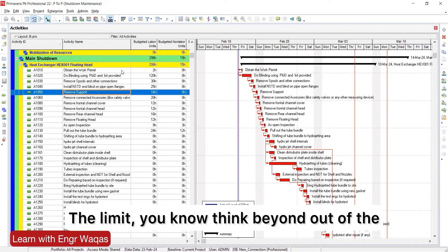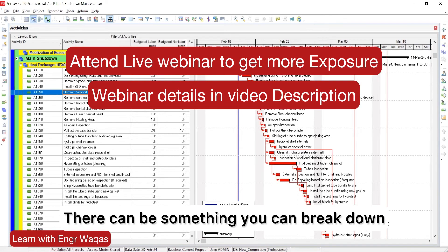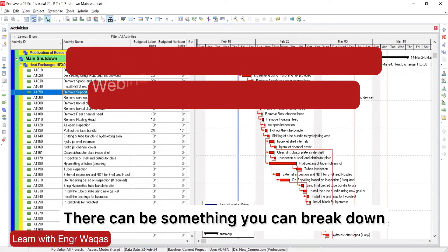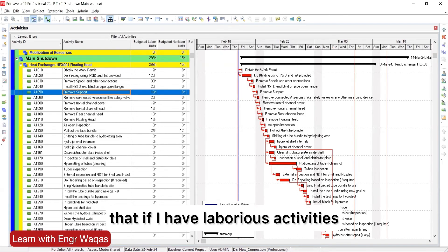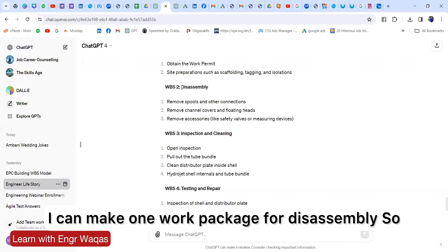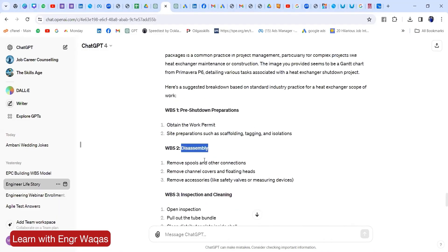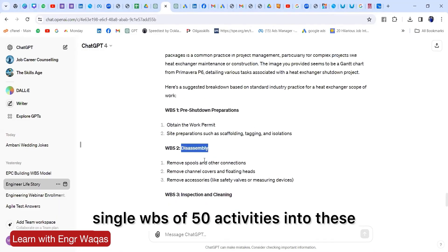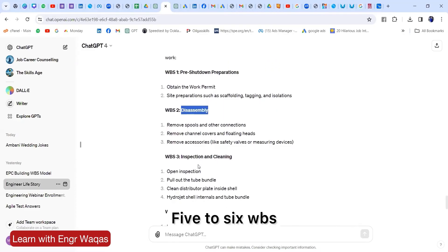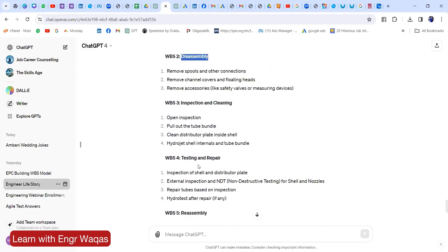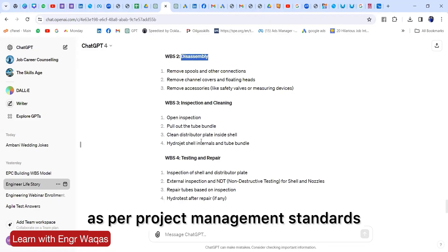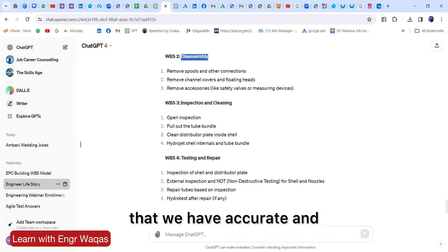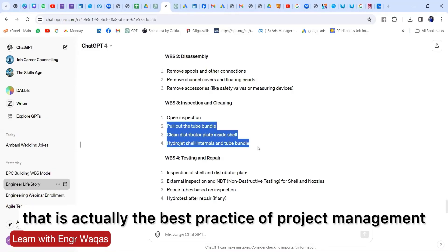Think out of the box. Sit with your project team. There can be something you can break down. As ChatGPT has suggested me, if I have laborious activities I can make one work package for disassembly. What is the benefit for breaking down this single WBS of 50 activities into these five to six WBS? It will be very easy when it is planned. It will be as per project management standards, and activities are filling within the limit. That is actually the best practice of project management.